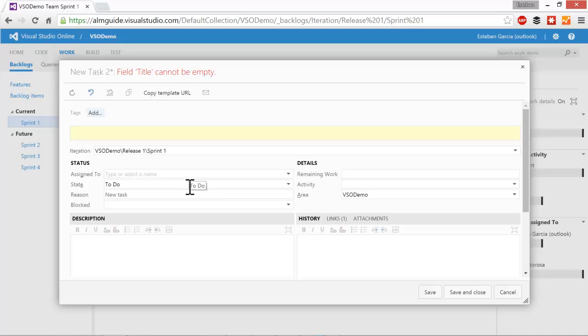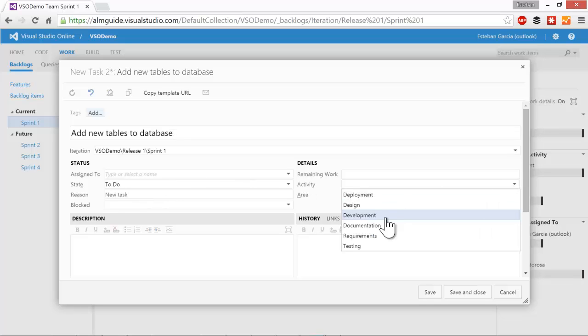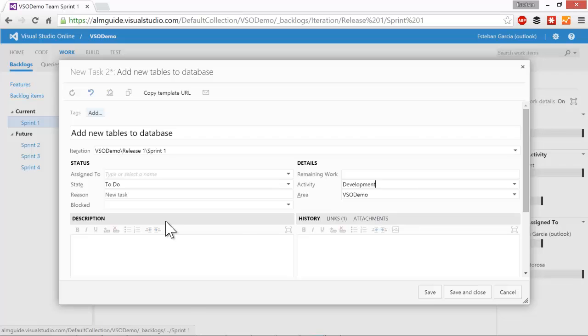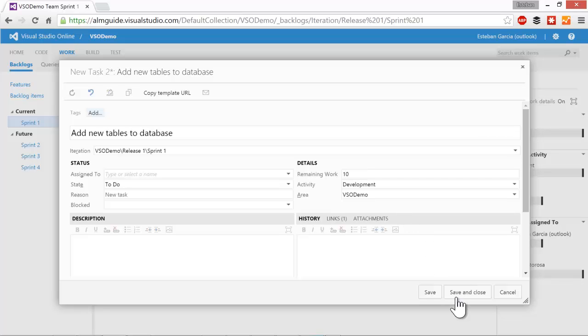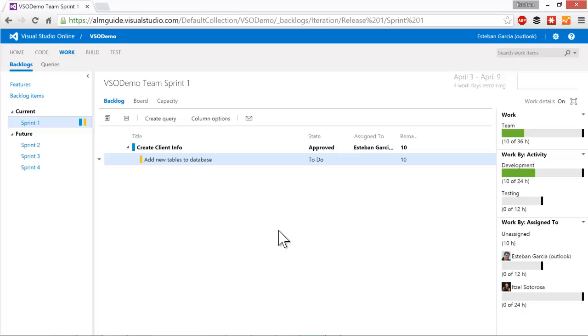And for this story, there's a few things we need to do. First, we need to make some database schema changes. So add my item there. And I'm going to say that this is an activity of development. I'm not going to assign this to a specific person, but I'm going to say this is a development activity. And this is going to take 10 hours. I'm going to save and close this. And you can see the task just got added there. The other thing you can see is on my right hand side, my development bucket just got filled by 10 hours. So 10 of my 24 hours are filled up. And for my team, 10 of my 36 hours are filled up.